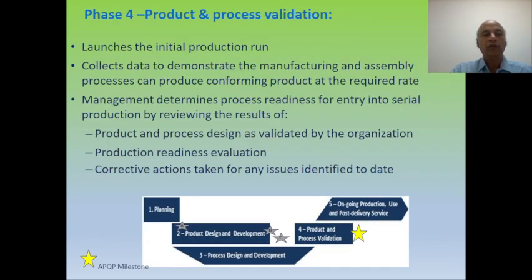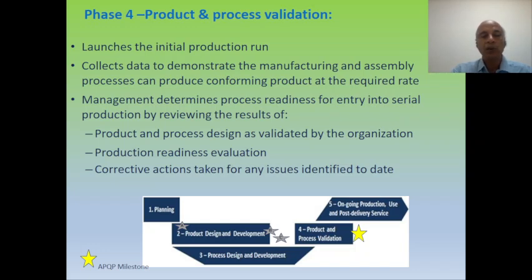Phase four launches the initial production run — also called trial production. Here we collect data to demonstrate that the manufacturing and assembly process can produce a conforming product at the required run rate per customer requirements. Management determines process readiness — whether all resources are available to enter serial production — by reviewing results of trials, including product and process design validation, production readiness evaluation, and corrective actions taken for any issues identified during earlier phases of new product development. Before entering SOP, every issue must be closed before the end of this phase.